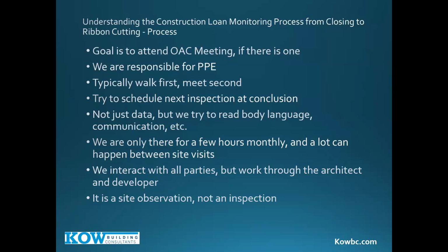And remember, we're only there a few hours every month. If we're on a construction project 2 hours a month and it's open 9 to 5 Monday to Friday and half day Saturday, we're there 1% of the time. That's it. A lot happens between those site visits. So we like to be on site and see how people are interacting. We like to read body language of, wow, the architect really seems to be behind with responding to RFIs, or wow, the contractors, that's the third failed inspection from the building department they've had. We need to talk about that. That's a trend that we don't like to see. So that's why we are on site reading that. But the OAC remote still gives you some good value, I believe.